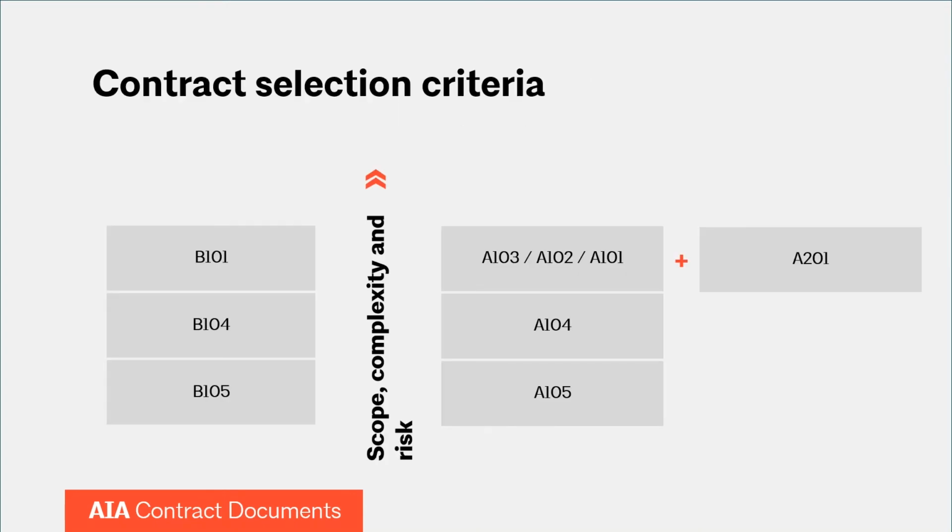I hope you're familiar enough with AIA documents to understand how part of what we're showing here is which owner architect agreements coordinate with which owner contractor agreements. You can see on the left, the owner architect B104 goes with an A104 owner contractor agreement. Prior to this week, on the left were your choices for an owner architect agreement. Many of you are using B105. You might think it's short and it's a published document, so it must be fine. But most of the time, it's probably not.